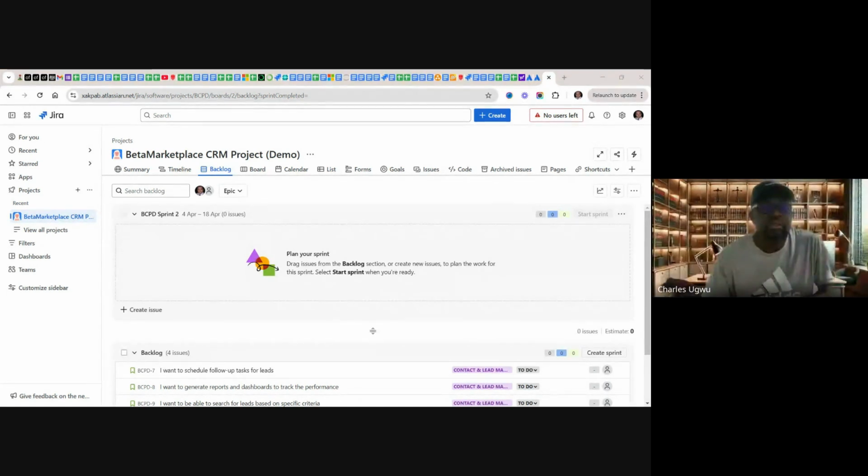Yes, a minimum viable, but if you read well again, you see where they say the product owner has the right to cancel a sprint. If the work is obsolete, you don't need it again, the market has changed, the product owner can give the order: I don't want this sprint anymore, cancel it and start another one.